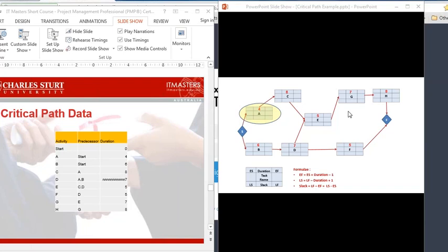So all the durations are in place. So what we're going to do now is to say, what is the earliest start date? So the earliest start date for activity A is day 1. Now there are different ways of reflecting this. Some people say you should put day 0 there, and then your calculations seem a little bit more sensible. But what PMBOK is suggesting is you start at the beginning of day 1 and you finish at the end of day 4, sorry, so there's the start, there's the end. So how do you get 1 plus 4 should give you 5? But because I said 0 is not there, you put in 1, therefore you put in a minus when you add: 1 plus 4 minus 1 gives you 4.